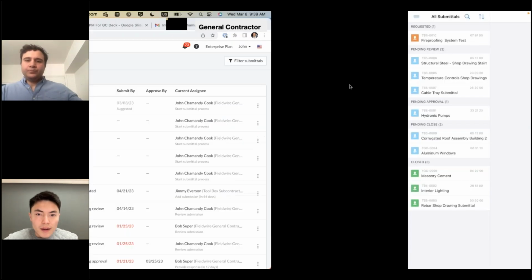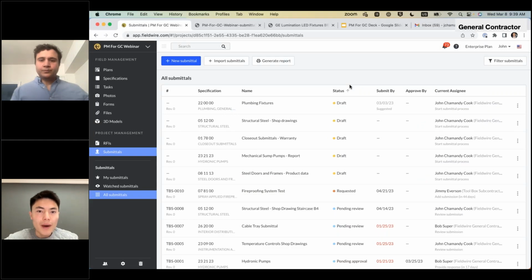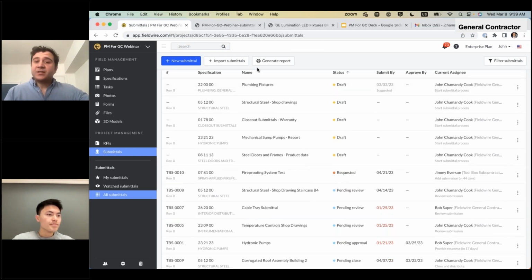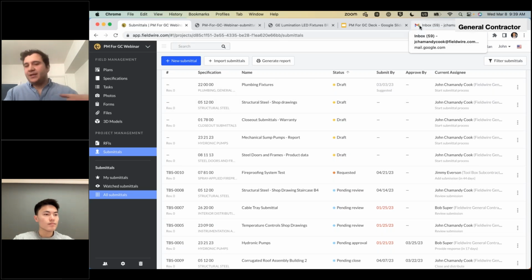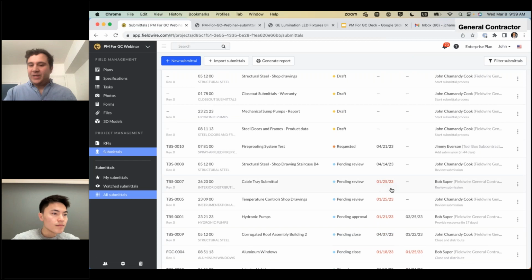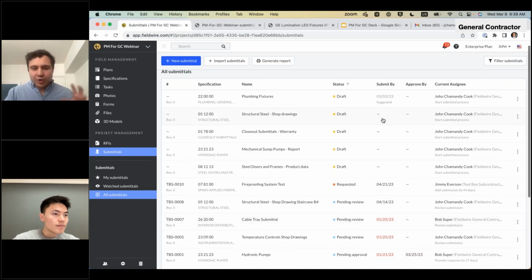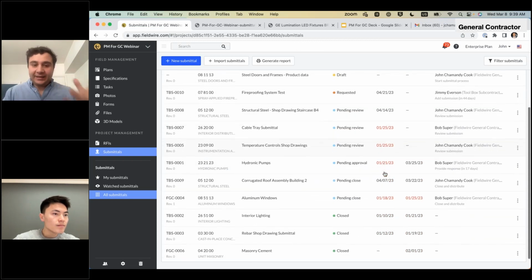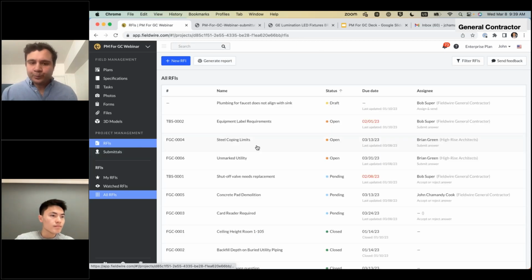Sweet. Another question here. Are there reminders for overdue RFIs and submittals, assuming they're late? Yes. So that's kind of like that check email reminder. You would be getting ping notifications, hey, 2 days before that it's due. Hey, get on this. You need to go answer this within Fieldwire via email if it was an RFI. Then also, we can see those red marks right here. You know exactly what's late just by living in your actual submittals or RFI live log as well.